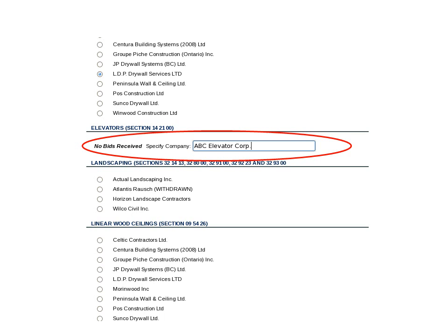If you have received no bids for a subcontractor section or division, then you can proceed as per the rules of procedure. Where the project documents require you to name a bidder, even though you received no bids online, there is the option to do so by filling in the name as shown.